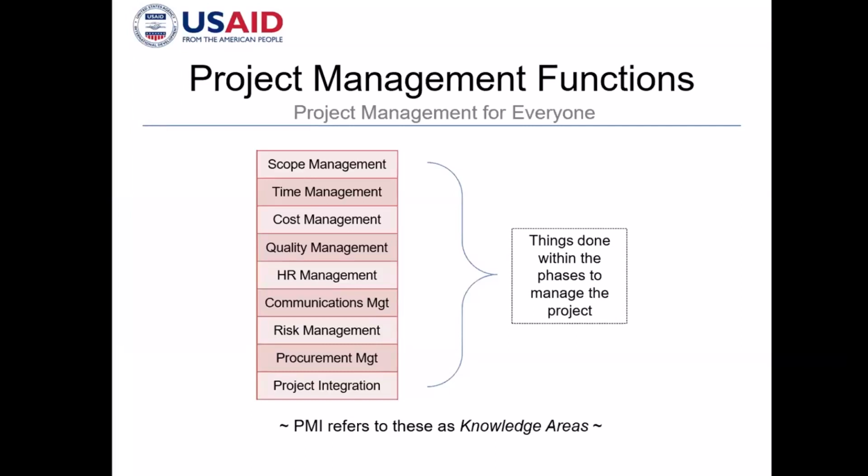And the next one is risk management. As you implement the project, there are going to be risks involved. For example, if you procure items that are required in the project, there are instances that the procured materials would be delayed because there will be supply chain issues, right?